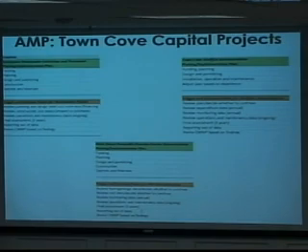That doesn't happen overnight. Mike and I were talking, and in my heart of hearts, I believe we could actually implement a demonstration for shellfish next summer, not this summer, but 2016 summer. But that's ambitious. That means that we're buying gear a year from now. That means we know how much we're putting, where we're putting it. I'm just talking, but the Gantt chart that you have in front of you tries to be what I would say cautiously ambitious, that we've been able to fund some projects so we can really start next year doing these demonstrations. But after town meeting, we may have to adjust that.